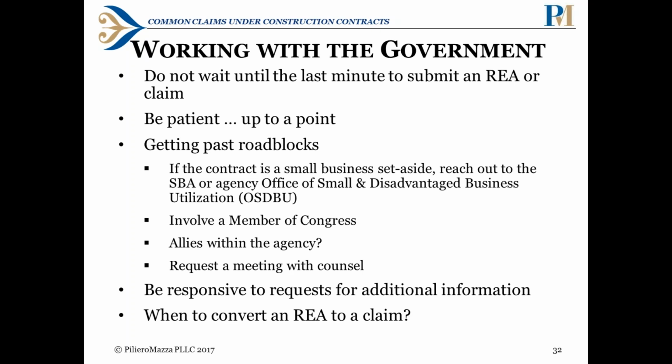This gets into the weeds, but the government gets funding from different sources. And once a contract has gone on for a couple years, those funds may be in prior appropriations, and they have to go through a lot of hurdles to get to them. There's also that once you get into claim world, the government can access funds in the Justice Fund and other sources, and they're not limited to just their budget for that contract. So they may want you to convert it to a claim just so they have more flexibility in how to pay you.